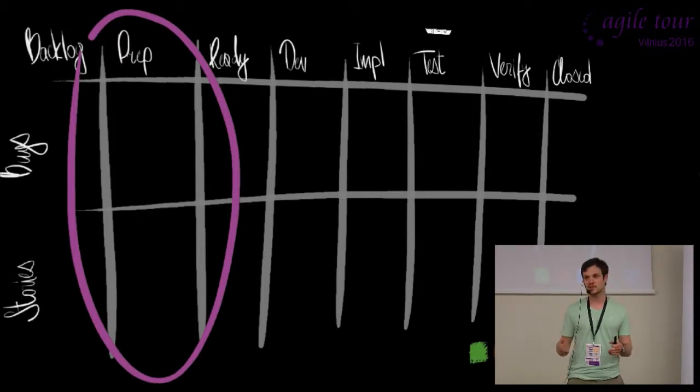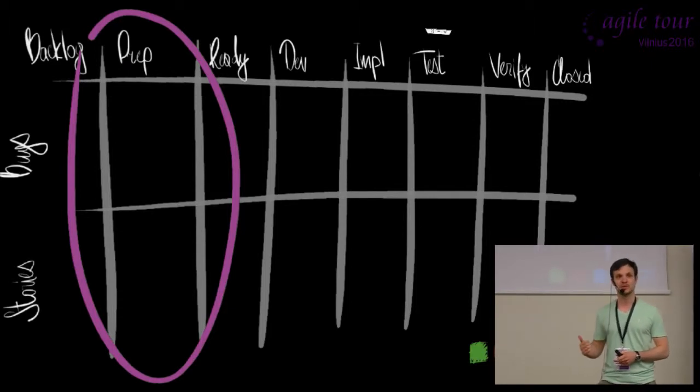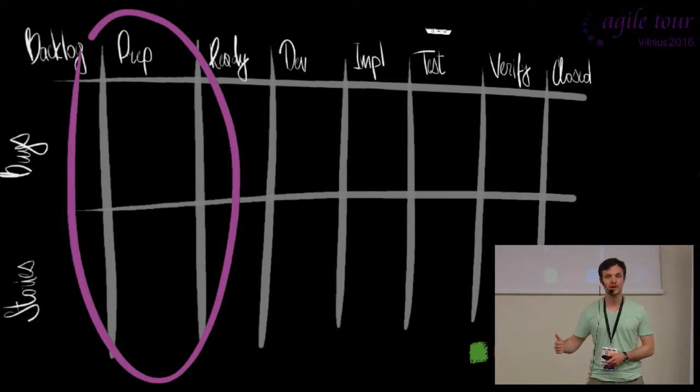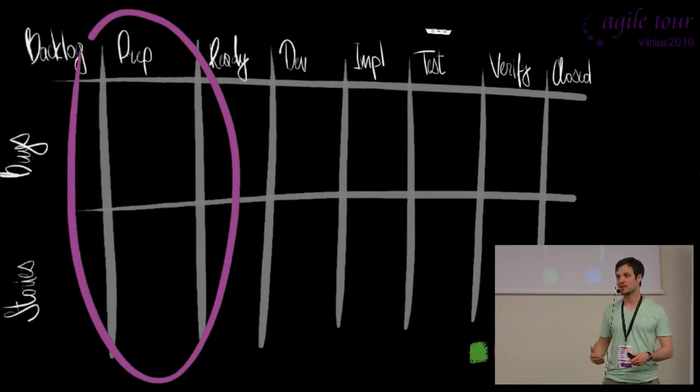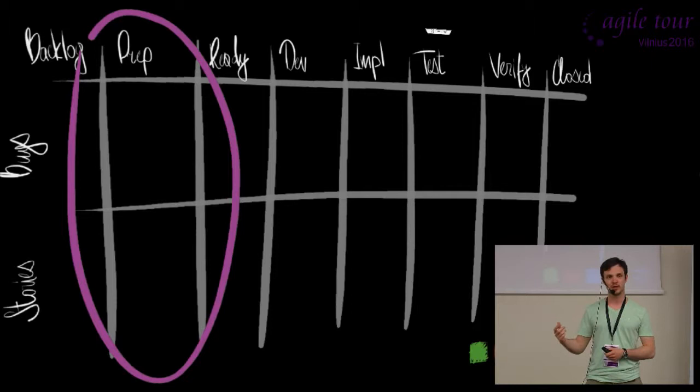What was also annoying to the customer, to our product owner, was that he could never understand when the real work had actually started. Because it was kind of development, but it's not. So when I talked to the team, I realized that this is something that they do, and I decided we need to visualize this. So I added this stage as a column on the board. It had quite a healthy effect, because just the presence of this column made the team realize that they are doing this work, and they probably want to complete it first as much as they can and make the story ready before they start the development.